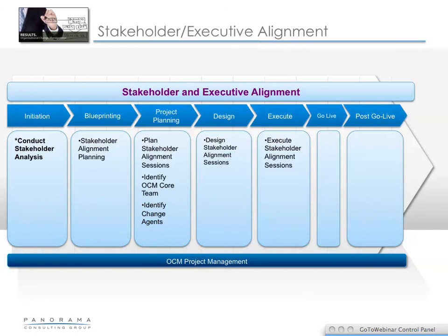Right at initiation, we conduct the stakeholder analysis and begin to gather names of individuals. Initiation really goes hand in hand with our software selection, and at that time we have identified a number of people. Of course, we typically have our steering committee, our executive team at that time. So that's where we begin to build our stakeholder analysis, and we continue to build on that throughout the project.